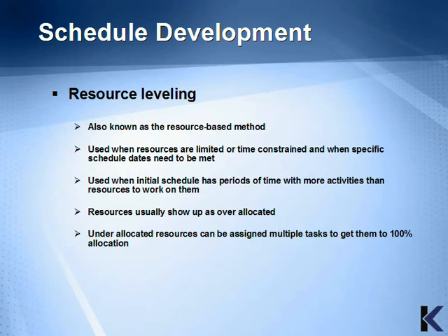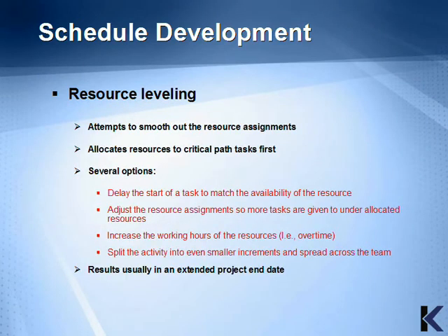Resources will typically show up as overallocated, and underallocated resources can be assigned multiple tasks to get them to 100% allocation. Resource leveling attempts to smooth out the resource assignments. It allocates resources to critical path tasks first, and you have several options here.